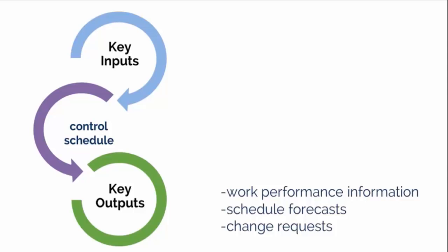Schedule variance analysis along with review of project progress, results of performance measures, and modifications to the project scope or project schedule may result in change requests to the schedule baseline, scope baseline, and/or other components of the project management plan. Again, these change requests are processed for review and disposition through the Perform Integrated Change Control process. Any approved changes that result in changes to the project scope or impact activity resources or activity duration estimates would require the schedule baseline to be updated to reflect such changes.